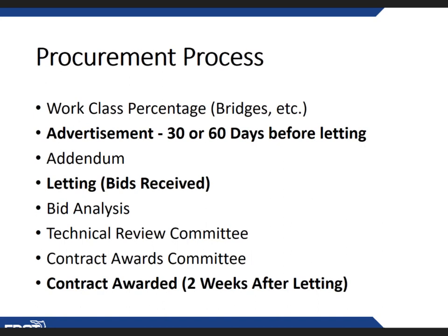On some of these, I've highlighted the advertisement, the letting, and the contract award. They're bold there because a lot of people see those and they only think of those 3 steps, and well, we can shrink that down in the number of days. But keep in mind on that advertisement, the longer duration is usually for those big projects where the more competition we can get amongst the qualified bidders, the better we, the taxpayers, are that we'll get some good prices.